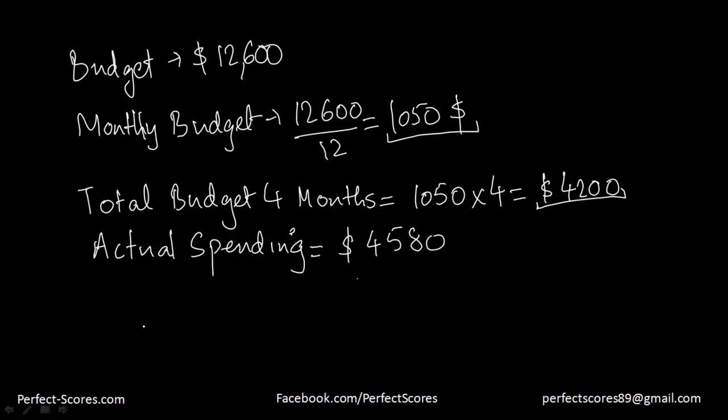So let's see what the question is asking us. The question is asking us how much was the project over its budget. So we have to find how much extra that they have spent. So that would be given by actual spending minus the total budget, minus the budget.